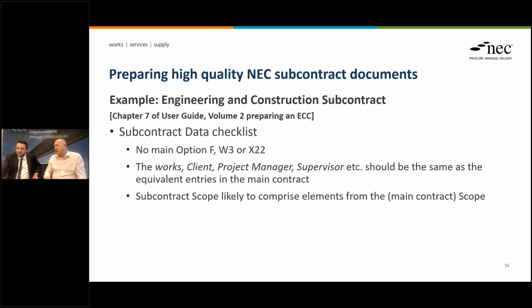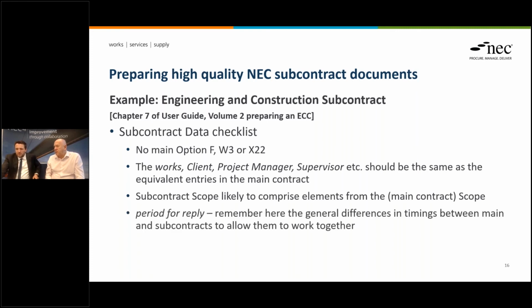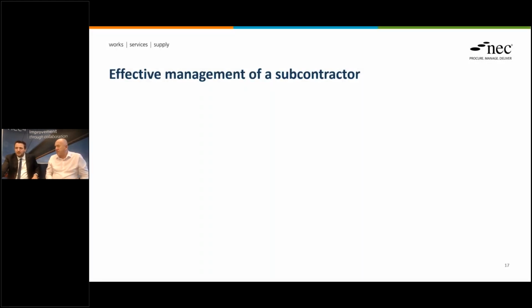So then main option, you mentioned that. We mentioned scope. And also period for reply, things like that. So you remember the period for reply applies where there isn't a timescale given to you locally to the clause. It makes sense to have in your mind that throughout the subcontract, periods for submitting things tend to be shorter, and periods for giving decisions tend to be longer. So maybe we just keep our period for reply dimensioning within that sort of range. Always remember, it's a long stop gap provision, nothing to stop you knocking spots off it, and deliberately shorter.